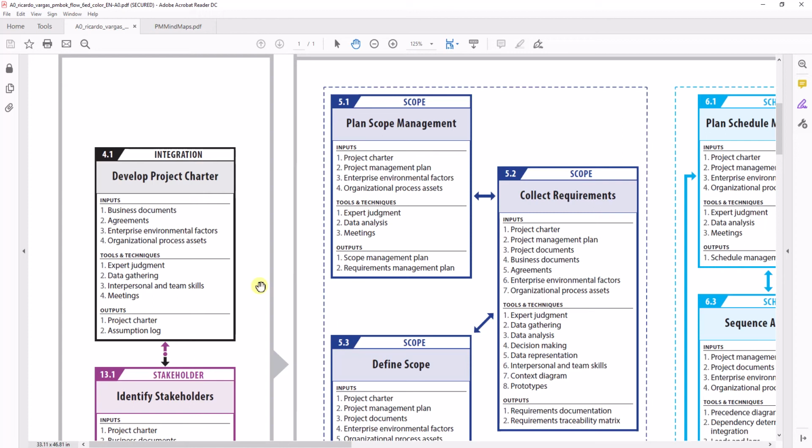In this project charter, high-level information about the project is there. For example, the high-level objectives, high-level timelines, high-level budget, a very rough list of stakeholders, and high-level risks, for example, that are at the business level, at a big project level, not individual to any activity. Some of the constraints will be mentioned, and do's and don'ts. Quite a lot of information is there. And the most important thing that you see in a project charter is the project manager being named. So it names the project manager, and the project manager is given the authority to utilize the resources of the organization to deliver what is expected from the contract and the project charter.